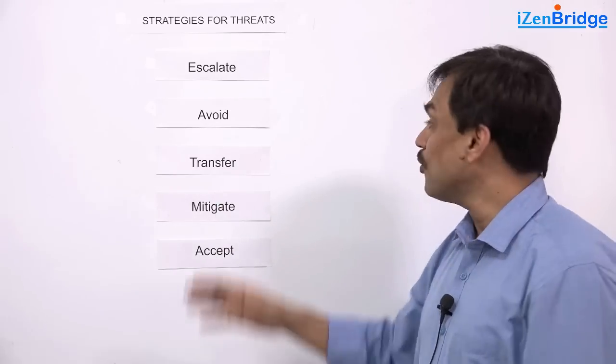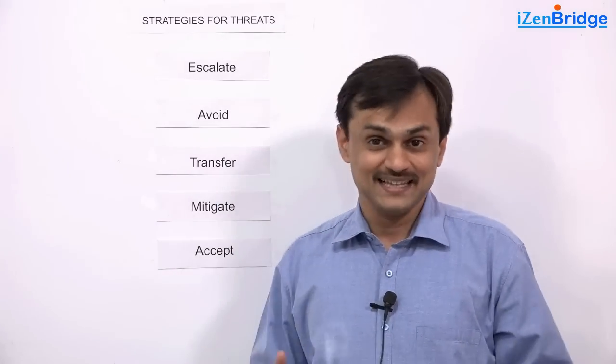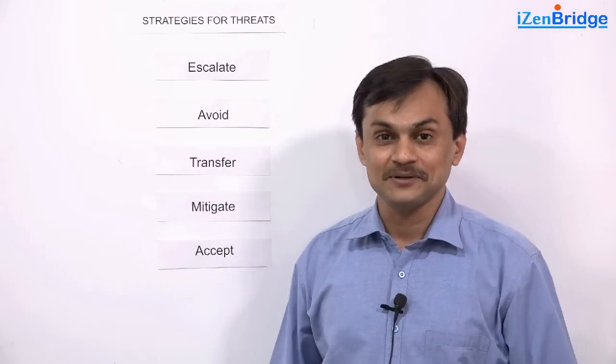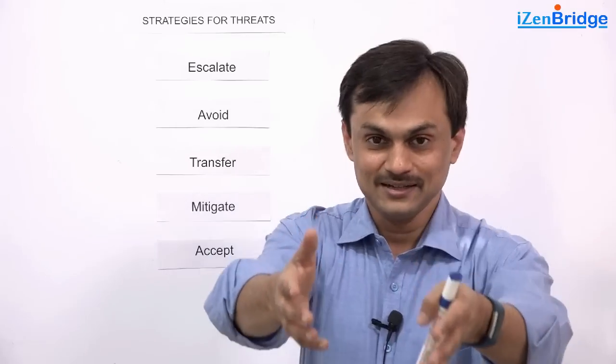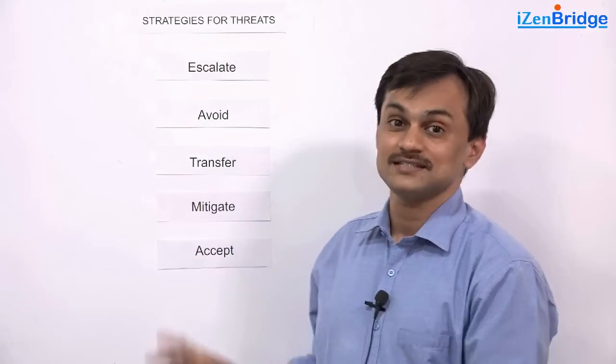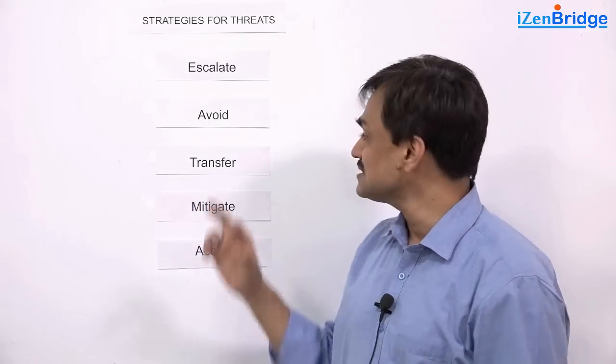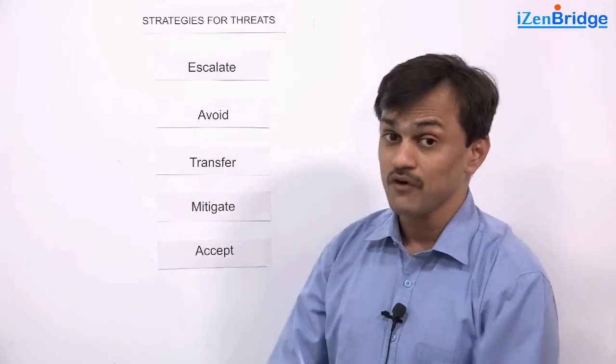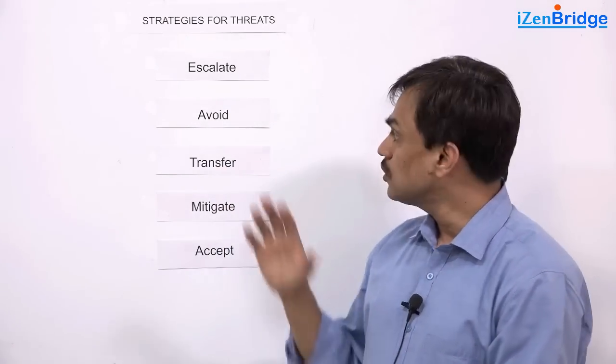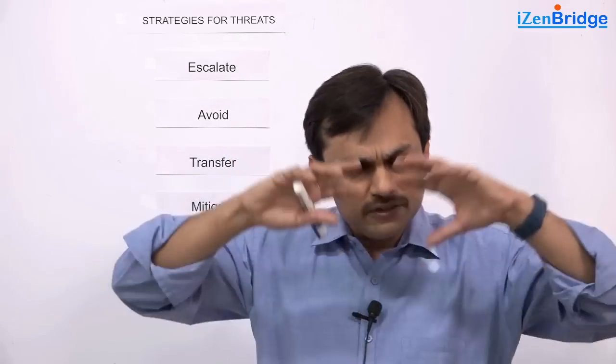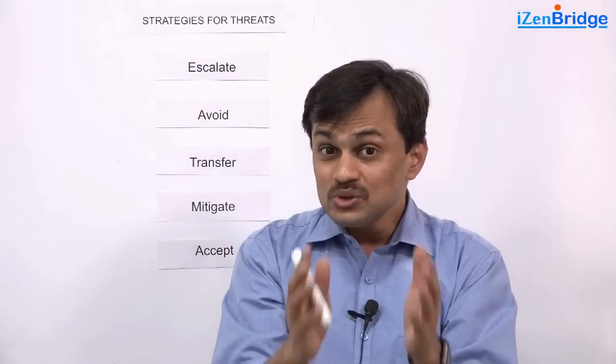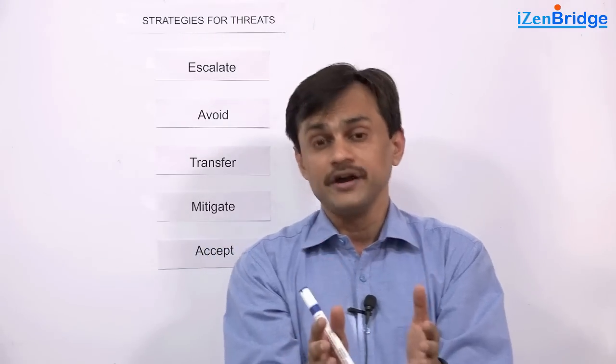You may think, oh, why don't we avoid all the risks? It may not be practically possible because the project may not move forward. Avoiding all the risk may mean not doing project at all. We do want to do business, we do want to take risks. Not necessarily all the risks need to be avoided. But there could be some risks which are so dangerous, if they occur, they remove the complete feasibility of your project. And those risks you may want to avoid.